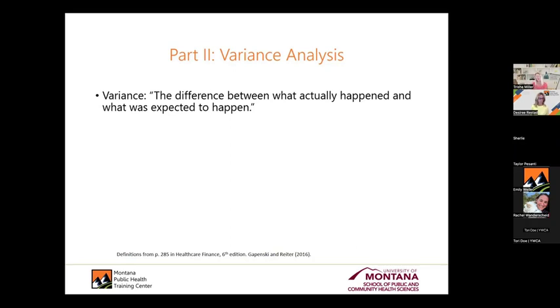So we're going to look at something that looks at a year's worth of data, okay? And you always want to do that. You want to see what we budgeted for the actual year versus what we actually spent. But I would suggest doing this variance analysis month over month, okay? And, or at the very least, and it might be an even more useful tool, take last year's budget month by month and compare it to this year's budget on a variance analysis. What did you spend differently this year than last year? And how does that line up with the budget that you are using?